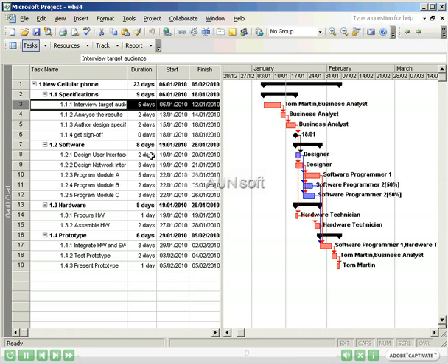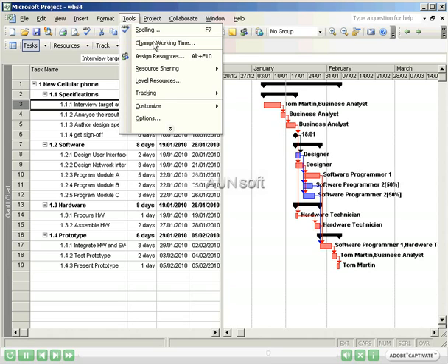Microsoft Project ships with a standard calendar that has working days of 8 hours, 5 days a week, 52 weeks a year. As a result, all of these days are available as working days. We know that this is not the case. There are statutory holidays which are not working days. It is important to tell Microsoft Project which days are not working days, so that resources will not be assigned to work on them. To do this, main menu, Tools, Change Working Time.